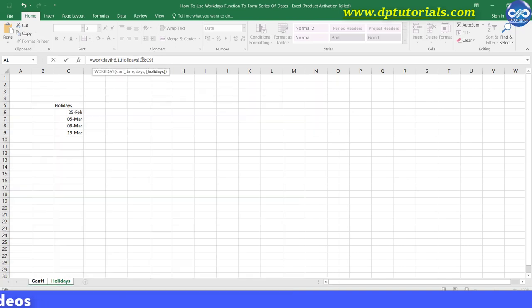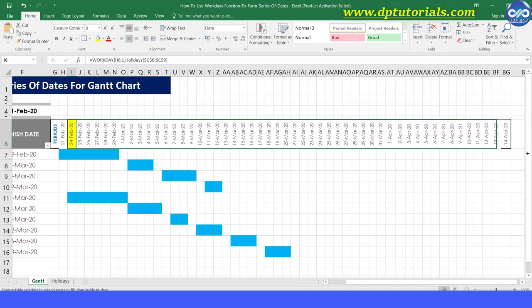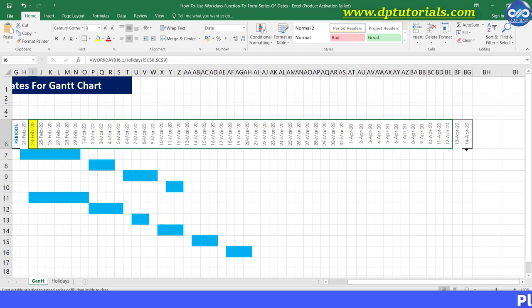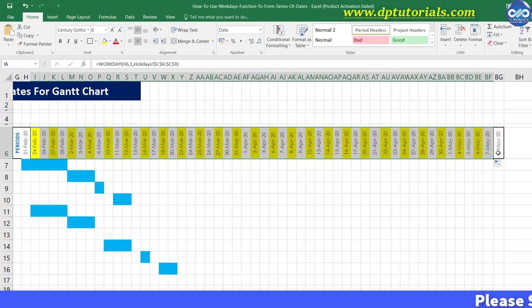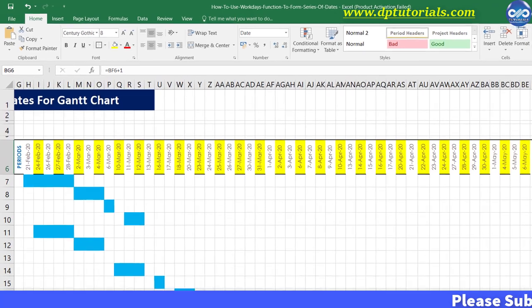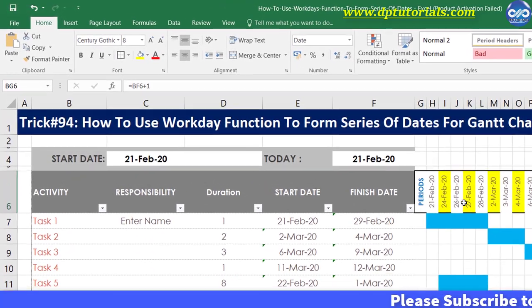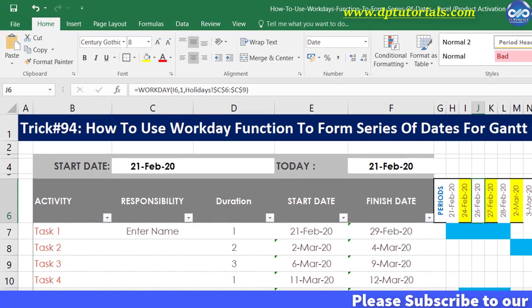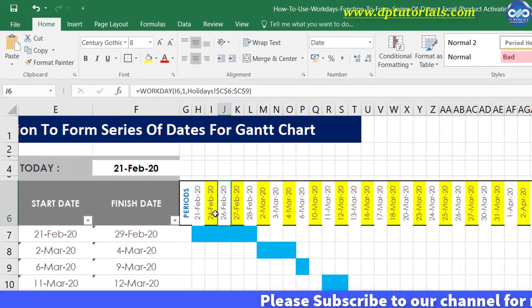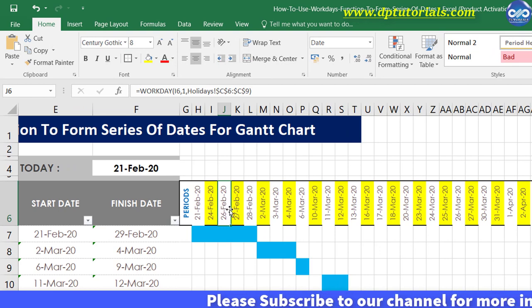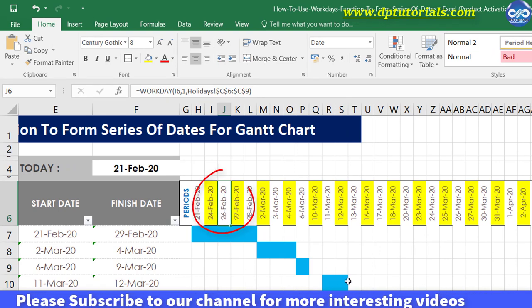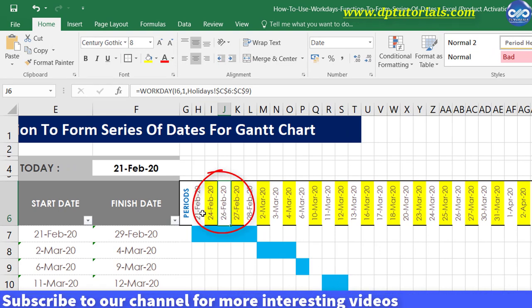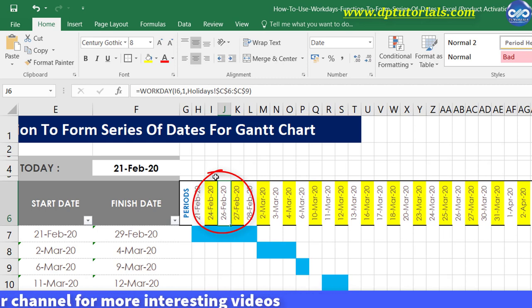And now drag this cell till the last column and then keenly observe that all Saturdays and Sundays are excluded in the timeline along with the holidays that we have listed. Like you can observe 25th February which is a holiday. You can see that there is no 25th February in the timeline.